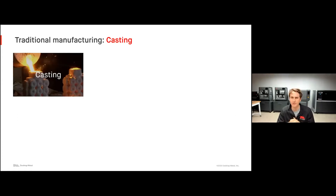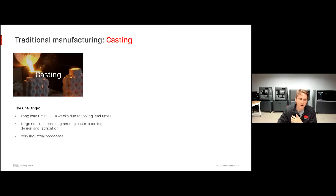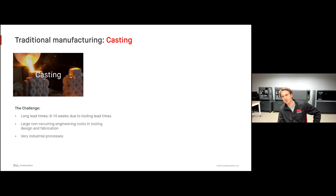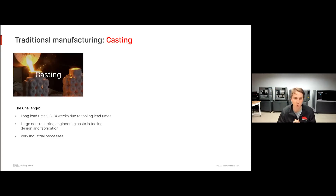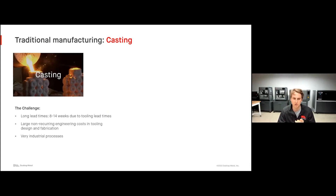Of course, traditional manufacturing like casting carries some challenges with it, and those challenges have some negative implications. When we're talking to our casting customers, it's very common for us to hear about very long lead times — generally eight to fourteen weeks for their first castings to come back from the foundry.